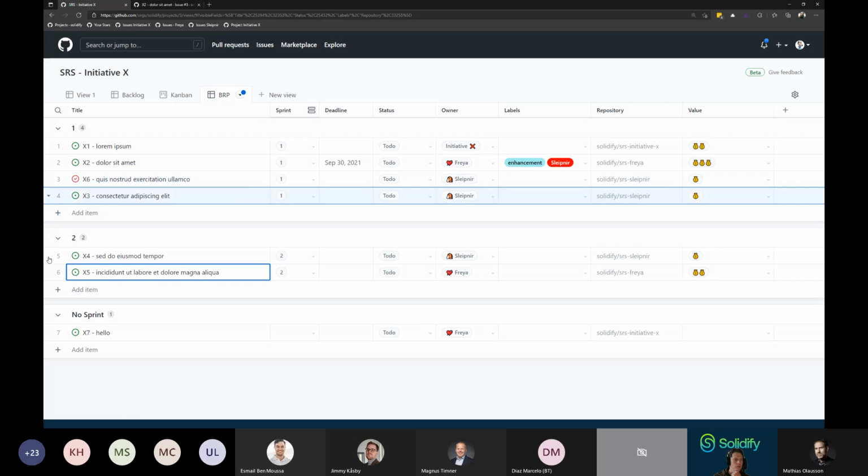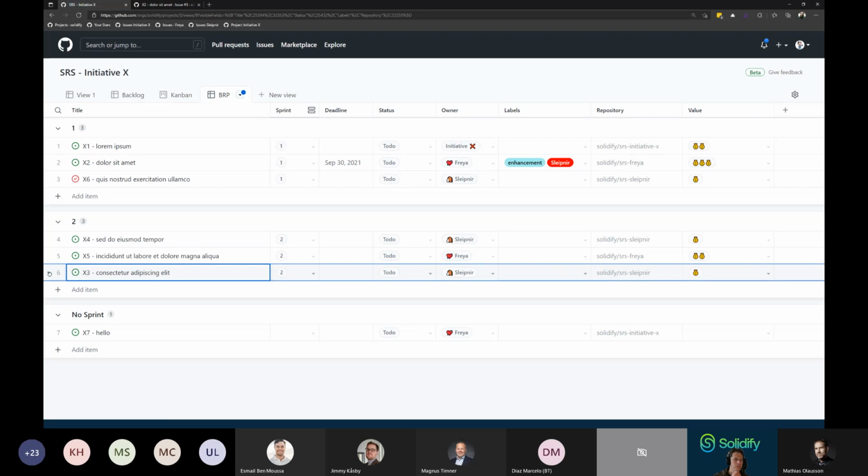And of course, just like normal, if you move something up your backlog, something else has to go down, and in this case, it's X3. And then, of course, I would expect them to talk to a product owner or whoever needs to be involved in this discussion as well, just to make sure that everyone is on board. And this is how you do big room planning.